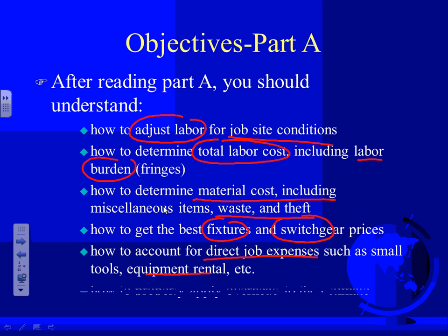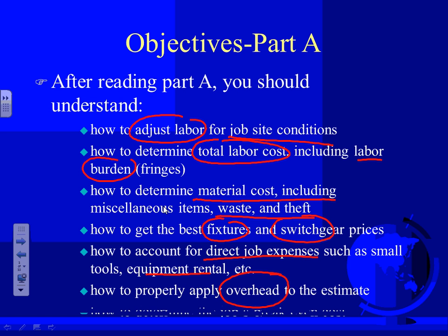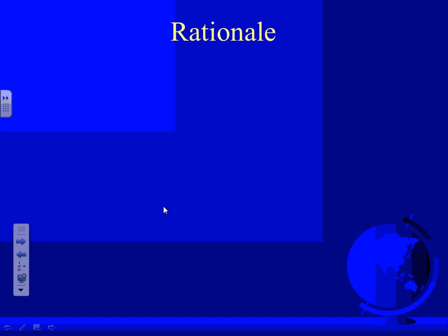So it's not really rocket science directly related to it. Then don't forget that we need to apply your overhead. Apply your overhead, like $13 per man hour or 30 to 40% of the overall project, and a break even. After you add your overhead and all the other direct costs to your estimate, that will get you your break-even cost.